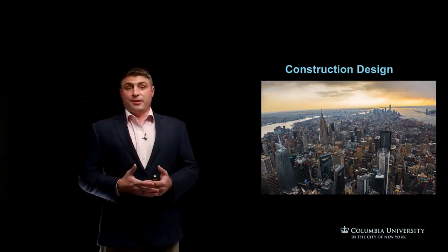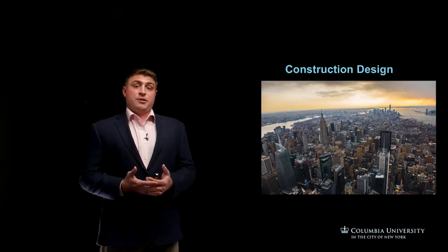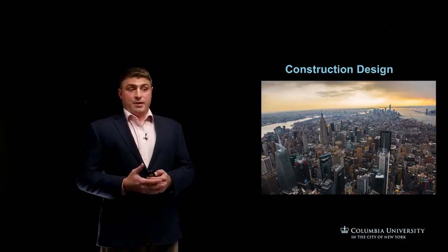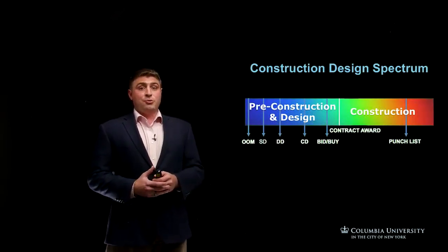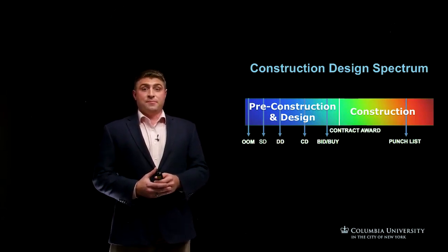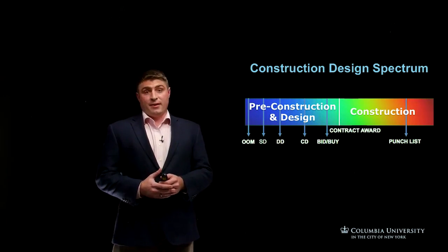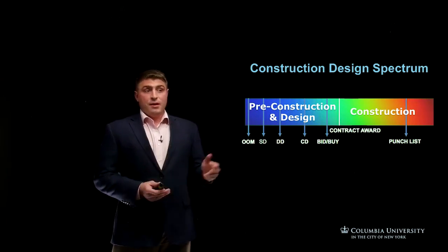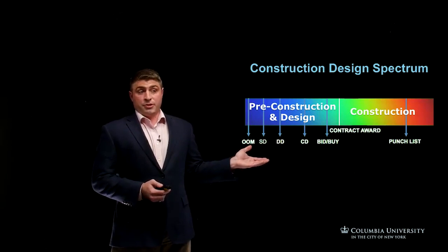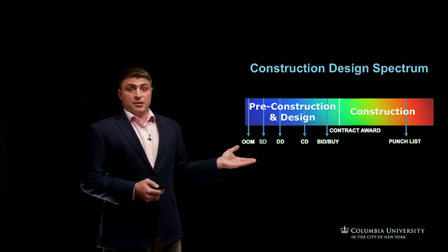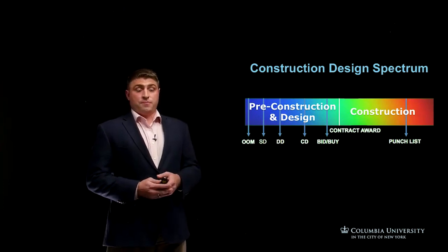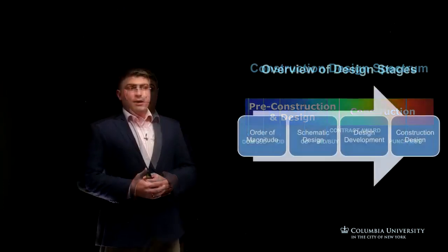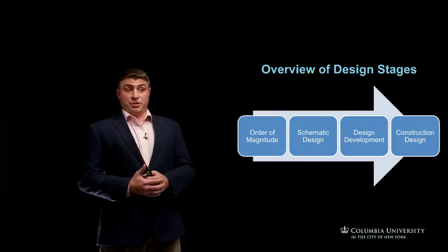As a construction professional, it is important to understand the construction design process and how it relates to cost management and estimating project costs. Depicted here, you can observe what we term the full spectrum of construction design. This shows you the full life cycle of design from start to end. It is worth noting that design changes can be made at any period along the design spectrum. Here, in the middle of the design spectrum, you will see that there is a clear demarcation of contract award, which brings us from the pre-construction and design phase to the construction phase. This is the point all design changes will be qualified as change orders, which will be covered more thoroughly at a later topic.